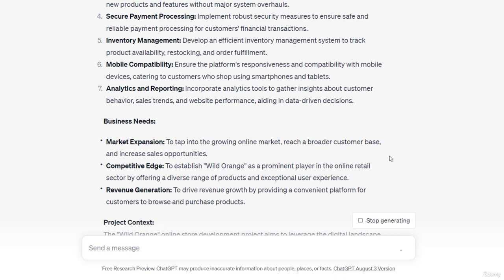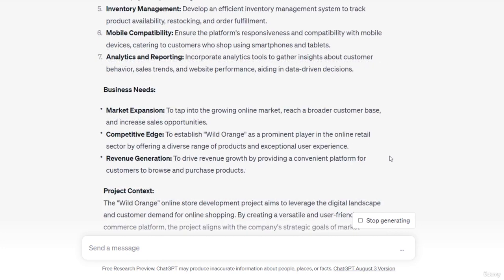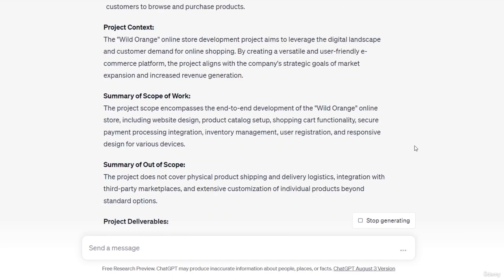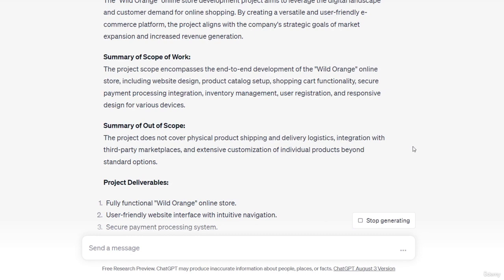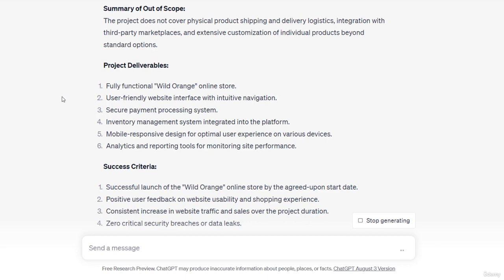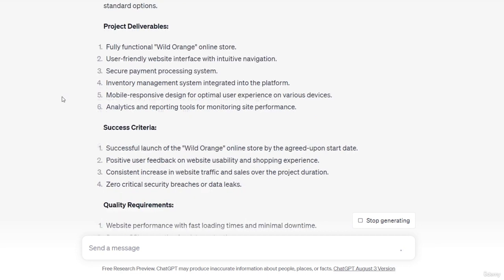The concept of the project charter is to keep it short. It is not a project management plan that potentially can be big and consist of multiple pages. Project charter is a simple one-pager, just a summary that is signed by key stakeholders to make sure that we are in agreement of why we are all here.